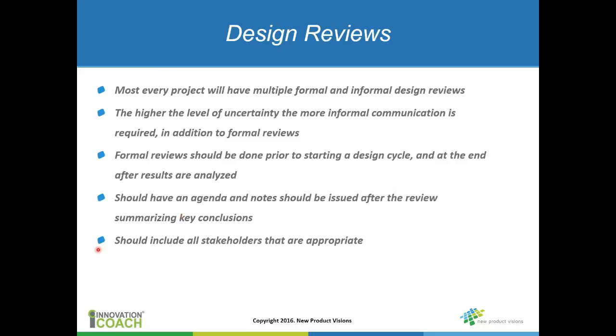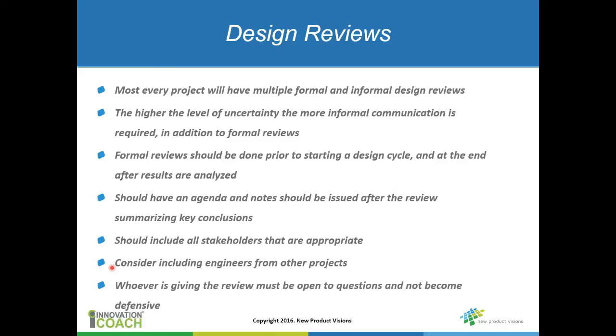Design reviews need to include all key stakeholders from the multiple functional groups. You might even include engineers from other projects to have kind of an independent view of the project. And importantly, whoever's giving that review needs to be open to questions from the team and not become defensive. And that's an important task of the project manager, to make sure you set the expectations.